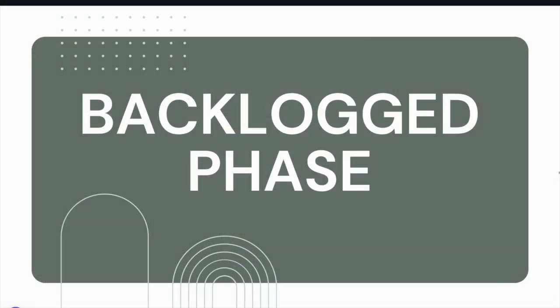Backlog Phase. This phase includes project ideas that do not currently have a responsible lab member, lack funding, or are too much for one person to handle currently. These ideas might be undertaken in the future, so information or thoughts about them can be included on the project card itself, and the project phase can be set to backlogged.